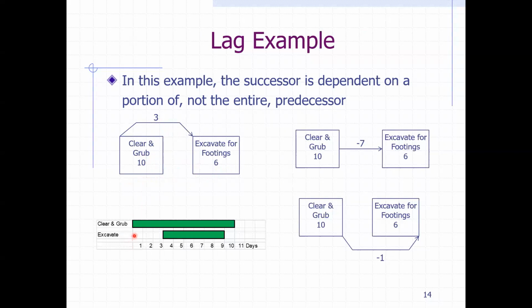From the Gantt chart, we see this is unrealistic. Even with the lag, it still doesn't work, because if you have 0 start and then you add 3 days on it, even if you give 9 days worth of length to an activity, it's still 10 that is the critical one. So to me, this is an unrealistic approach, even if it's a start with a lag of 3 days.